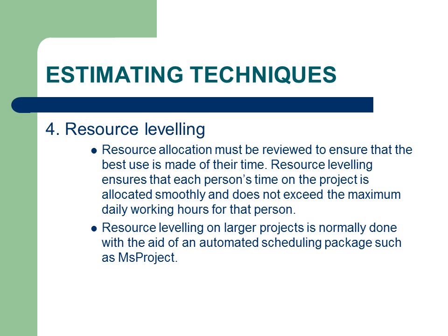It's important that project staff are allocated to activities for the prescribed number of hours per day and do not have periods with nothing to do. This is both costly and also demotivating for the team member. Once you have developed your schedule, always review your resource allocation and make adjustments, especially where resources are under or over allocated and conflicts occur. Scheduling software packages such as MS Project have tools which assist with resource leveling.